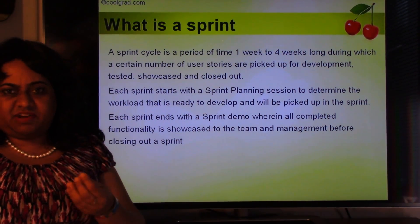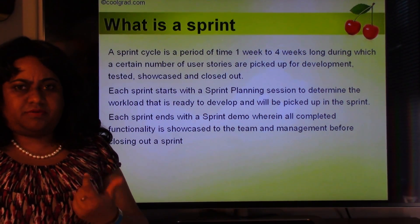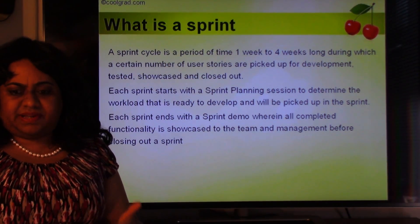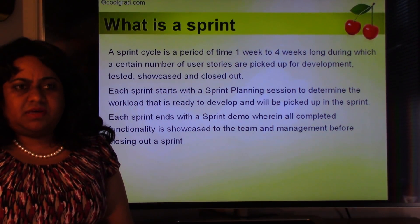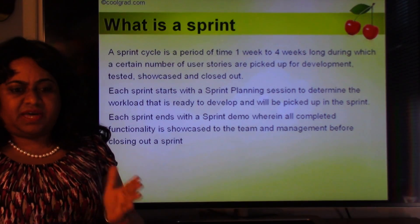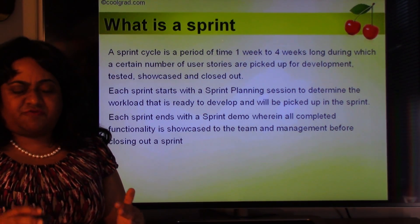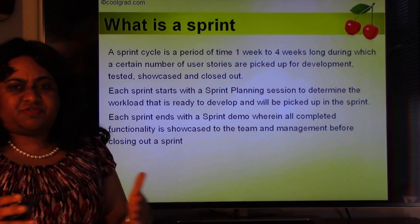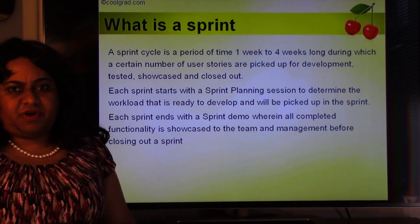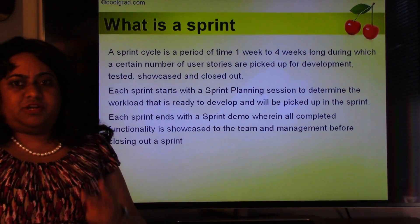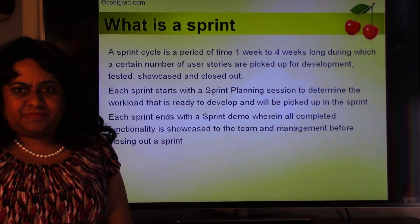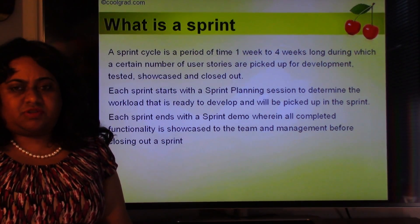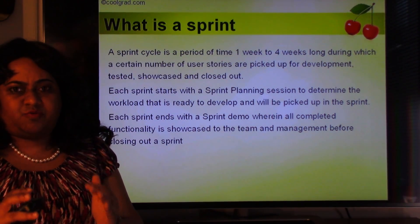For each story, we put in the level of effort estimation, which can be in story points or hours. This might take 30 hours or 60 hours — all decided during the sprint planning session. We sum it all up and pick up stories worth our team capacity. You might pick up 20 or 30 stories — the number isn't important, it's the number of hours that matters. Sometimes two complex stories take 800 hours; sometimes 60 simple stories take the same. The planned velocity is how much work in story points or hours you pick up in sprint planning.